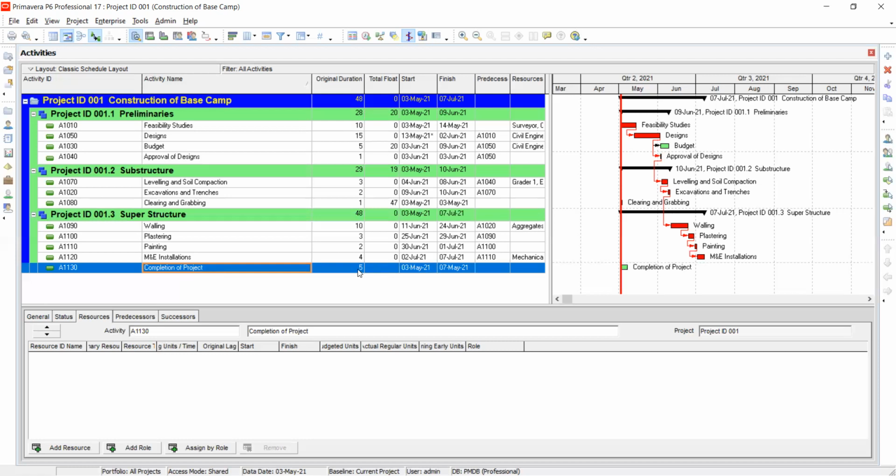Yeah, so you see it already has 5 days, but give it 0 days. So it should have a date. Fine, it doesn't consume time, but it should have a date. Why? That one just marks that on that date we'll reach that milestone. But it's not that it's going to consume any time. No, it's just that date we're going to reach that particular milestone.